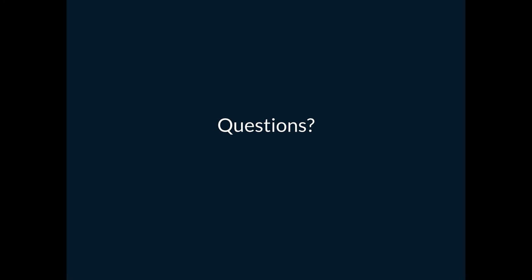Yeah, we do. So the comment was just that there's kind of a re-estimation process after you do the big estimation among the team. Because when we do a tender, we obviously don't get our whole team to estimate it. We get a single dev and our tech director to make sure it's not wildly inaccurate.